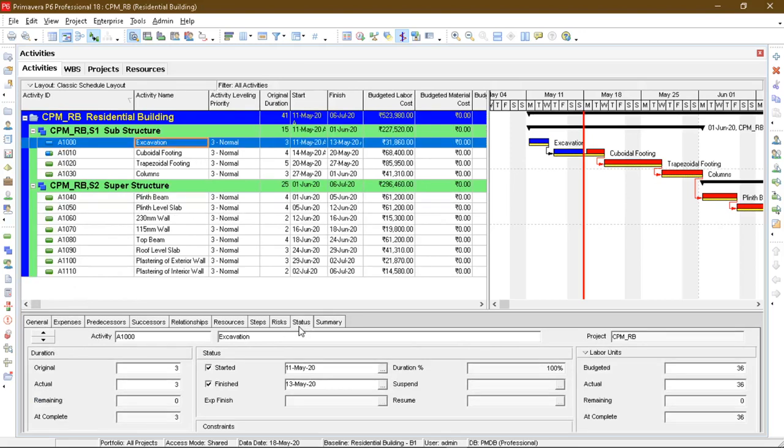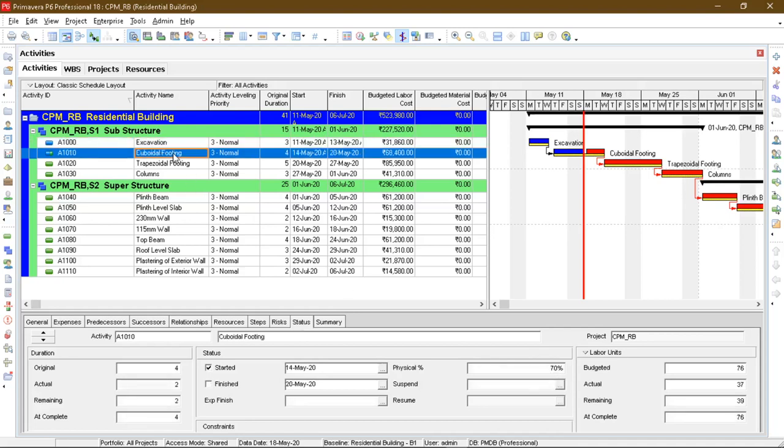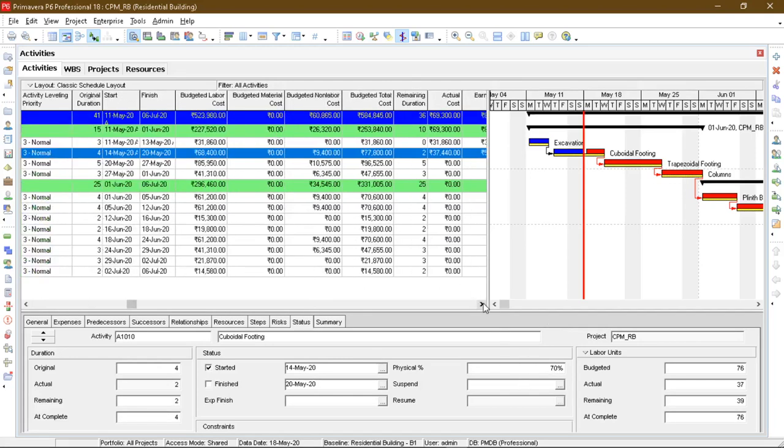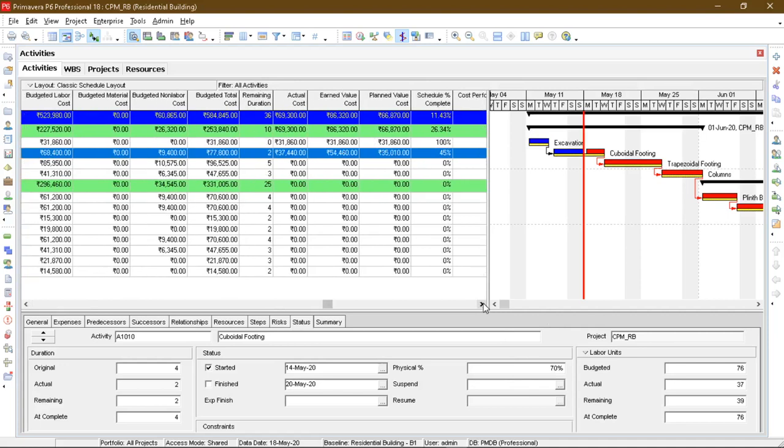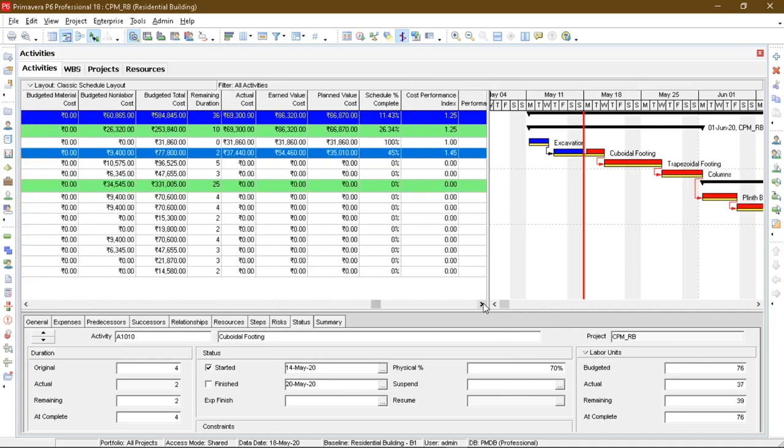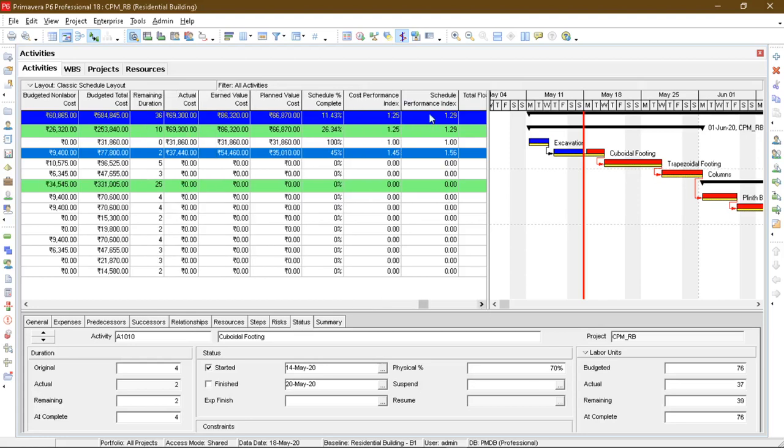Status 100% completed. And for cuboidal footing, I have defined it for 70%. It was almost completed before. So as you can see, the cost performance index, I have changed the cost performance index to 70%.